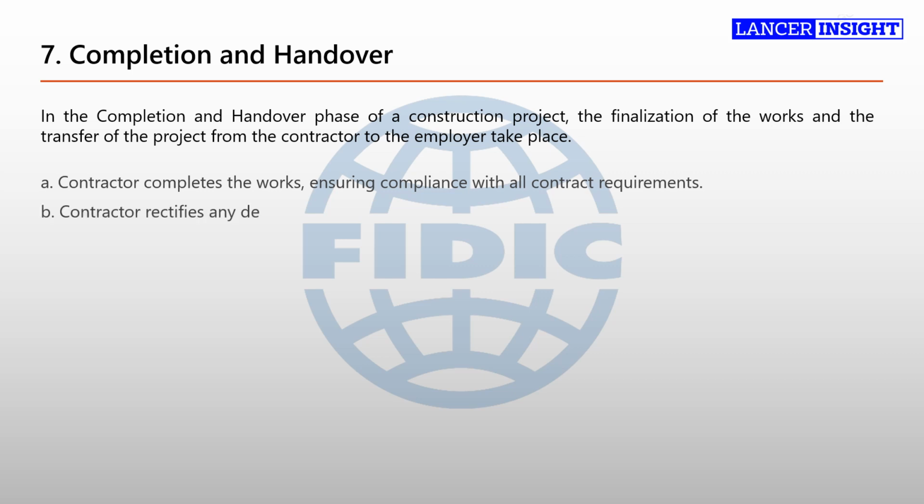B. Contractor rectifies any defects or deficiencies during the defects liability period. After the completion of the works, the contractor enters the defects liability period. During this period, typically specified in the contract, the contractor is responsible for rectifying any defects or deficiencies identified by the employer.